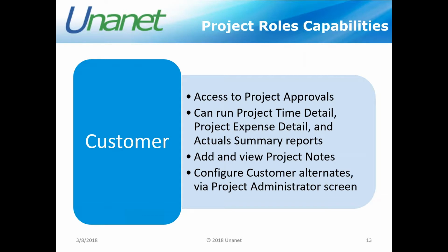The customer role can run a project time details report, a project expense detail, and an actual summary report. They can't run any other reports in the system other than those three. They do have the capability to add and view project notes. Now, I'm not going to talk about project notes and everything that you can do with those because that's not applicable within this webinar.